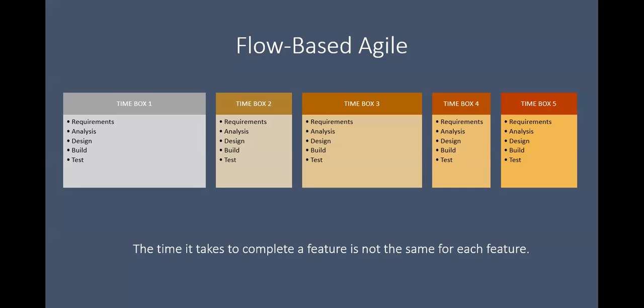However, greater variability from other sources such as work item size, demand patterns, type mix, class of service mix, and external sources require suitable buffering to absorb the ebbs and surges in flow through the system. Additional buffers may be required."